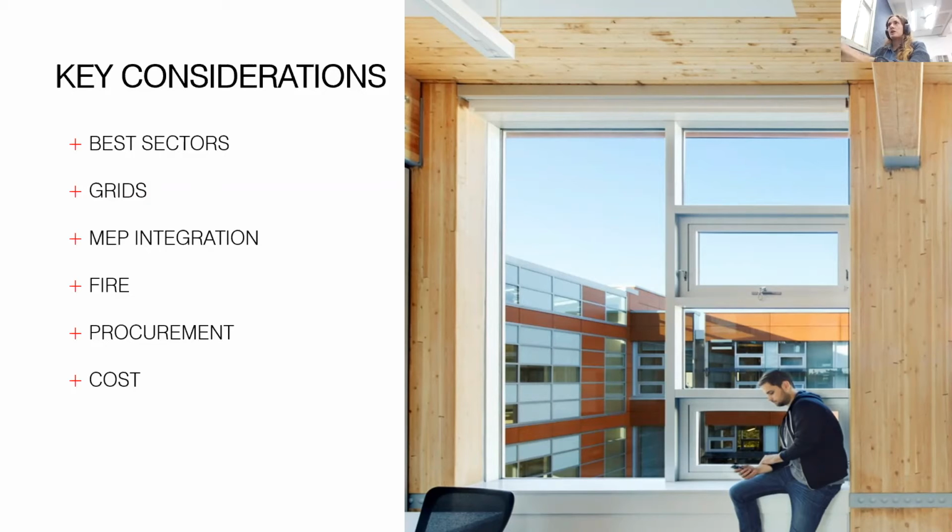I just had a quick question here on lead time for mass timber on Market Square. We pulled our timber on that project from Binderholz, who is a European supplier, and they were looped into the conversation probably 2 years ago to bring them on board for mass timber. I don't know what the exact lead time was at the time, but usually we were looking at in the realm of like 9 months to a year. Okay, I'll finish running through this and then I'll come back to the questions at the end.